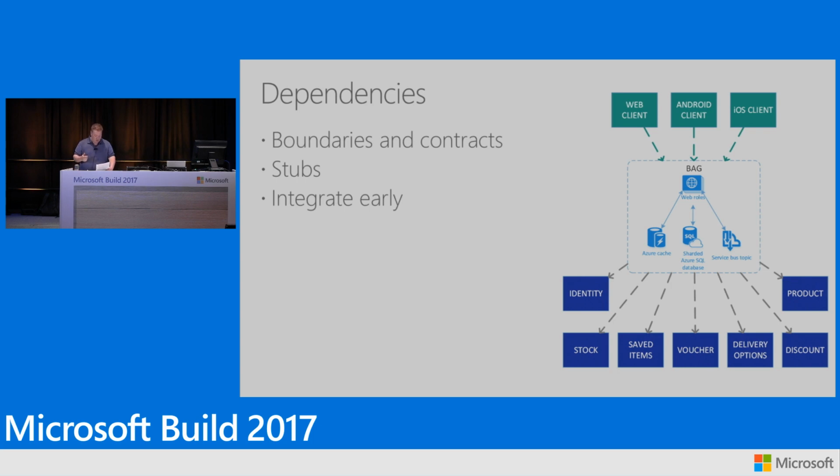As everyone here will know, the key to success is to integrate early. So we made sure teams were very clear on the contracts, which were defined as one of the very first things they did. And then we put a stubbing strategy in place. So we utilised Get Sandbox so the teams could independently create their own stubs and manage them, and they could develop before other teams had actually completed their work. But we also encouraged the teams to integrate very early, so as soon as the service was semi-consumable, we'd get them to integrate just to see what happened.